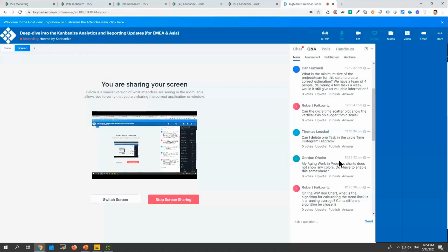The number of work items delivered matters to the extent that it's not a good thing to have many days with zero throughput. If you have many days with zero throughput, then the forecast will not be that reliable because we will be hitting 0, 0, 0, 0, and then there's no guarantee that we'll project reliably in the future. So if the work items are big, I would suggest maybe break them down a little so that you can deliver something at least every other day. That's when the estimation is going to be more reliable.